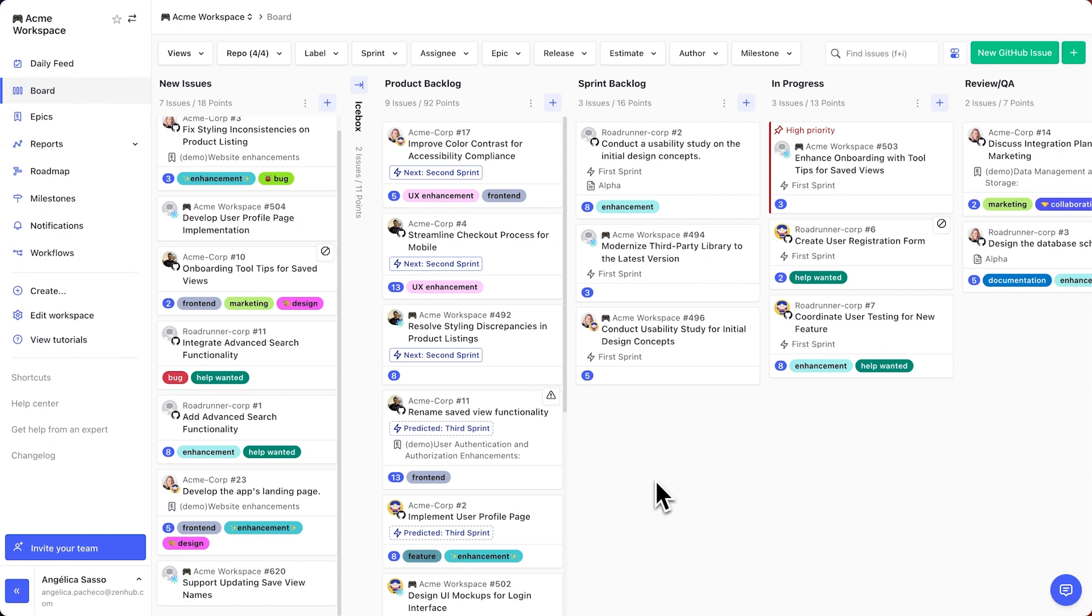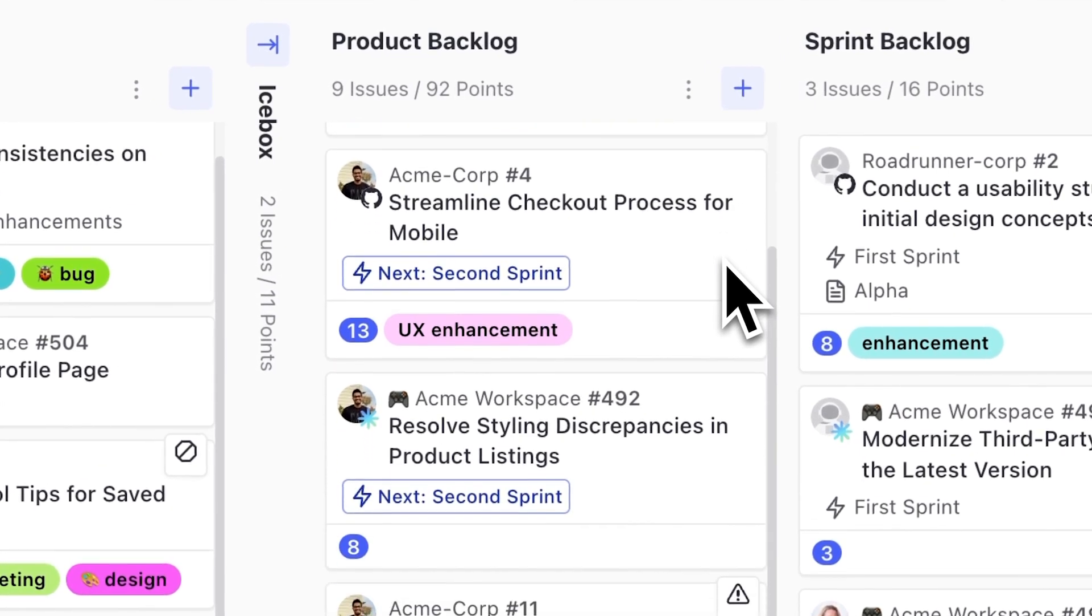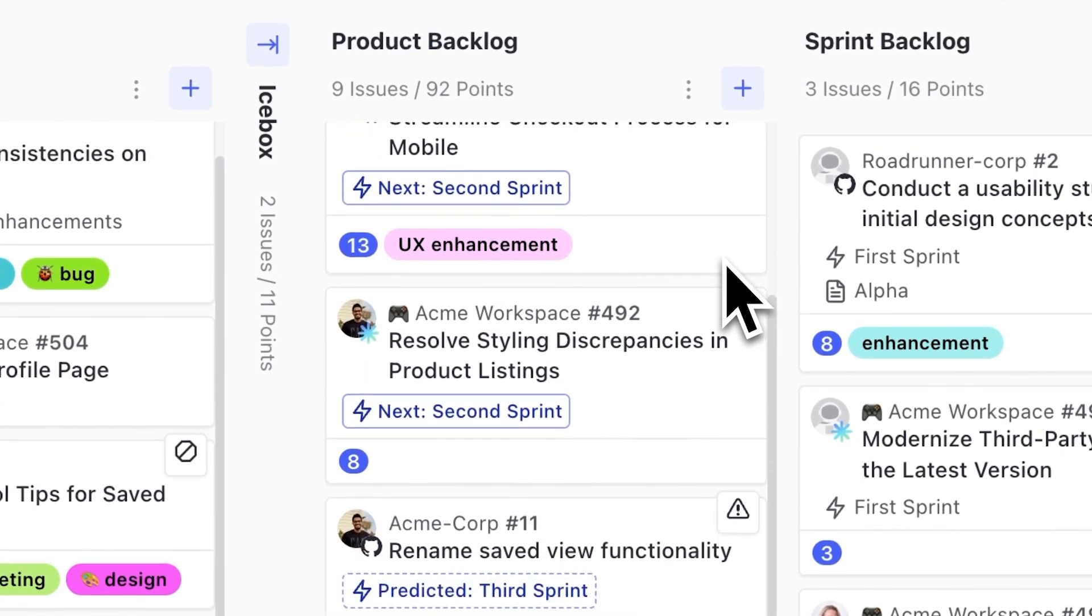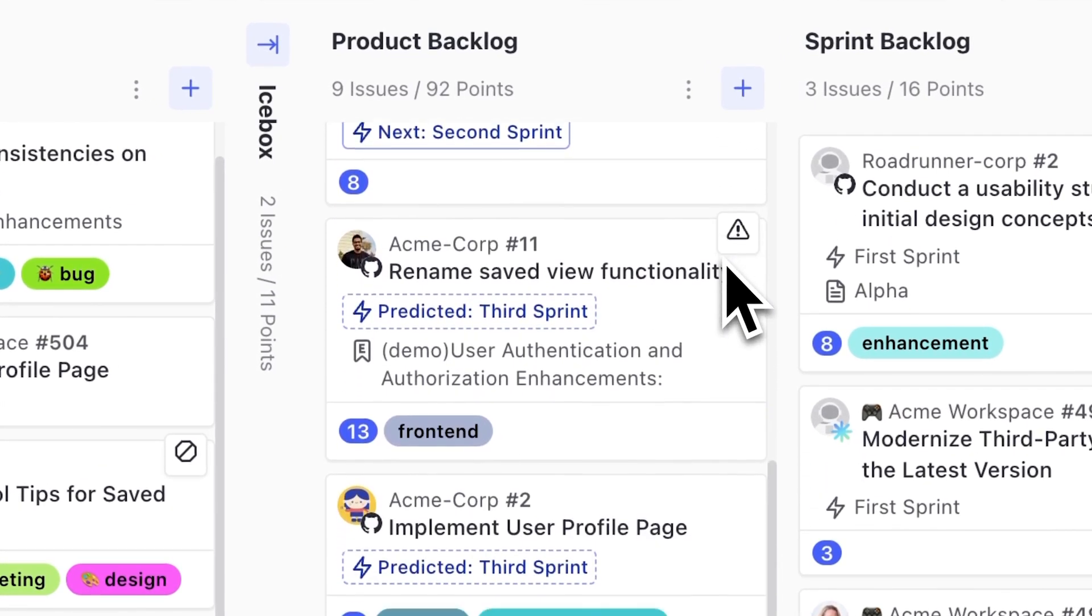That alone is amazing, but we've gone beyond that and will now predict when the rest of the issues in your backlog will be done. This is an amazing prioritization tool because you'll be able to tell, at a glance, whether or not the work is going to be done when you need it to be done. You can just scroll down through your backlog and see which sprint an issue will be included in.